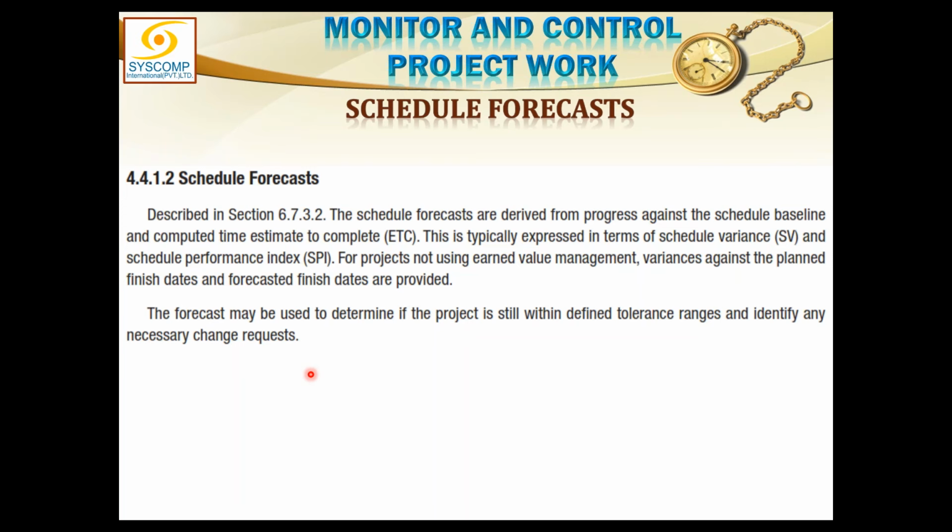So all of these controls are conducting their own analysis. They are finding their variances and establishing trends, doing some calculations, doing some analysis, and ultimately reporting it as work performance information. The thing which was generated from execution was called work performance data.